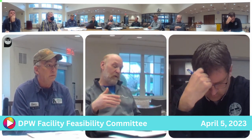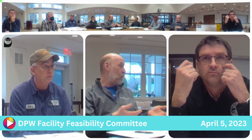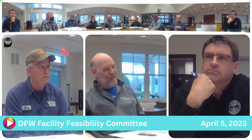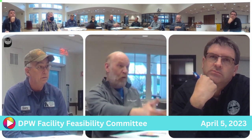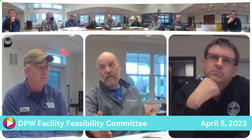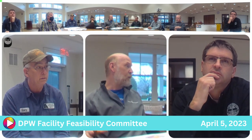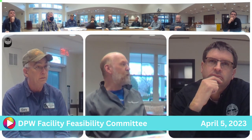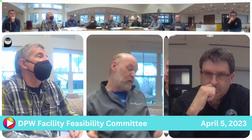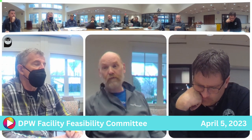One would be to get a design to a certain point, get a pretty good estimate, and then go to a town meeting and procure the money. How that happens, I don't know. That's okay. Another option is to bring it almost to bidding and get a more detailed estimate. Third option is to put it out to bid, get an actual contractor to bid on it, and then go appropriate money after that point. That's sort of a little riskier, but that's been done fairly often as well. Okay. Obviously, whatever process we would do, we'd have cost estimates along the way so we know where we're at, for sure.